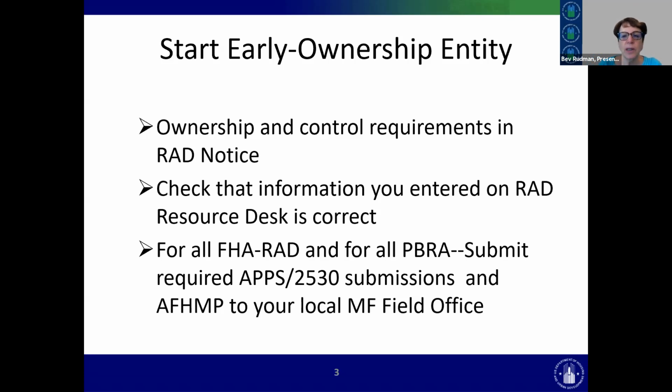that is used in RAD conversion. It has to be finished in RAD conversion, but it's not a RAD process. It's still a multifamily field office process. So again, this is something that you might even make your submission and it's a year later and maybe it fell through the cracks, maybe there was something missing and somebody didn't realize it and so it was never acted upon. But if you haven't heard back, it's not the Office of Recapitalization that's going to be able to help you. It's got to be you talking to the field office.